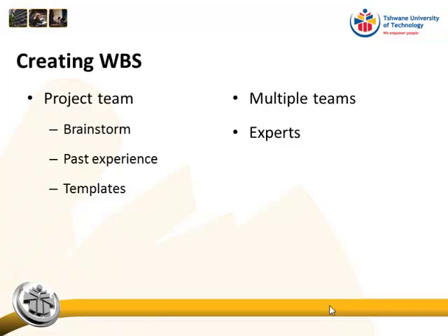Right, and then one can also use templates, but this is normally in an organization where you have done similar projects before and you then use a template. In a sense, I've also tried to help you by giving you a template, but you're going to have to make that template work for yourself. Right, and then we use multiple teams, and sometimes we pull in an expert. So we might ask experts that are not necessarily working on the project, but that can contribute to help us plan the project, to come in and sit and look at the work breakdown structure and tell us what's missing.